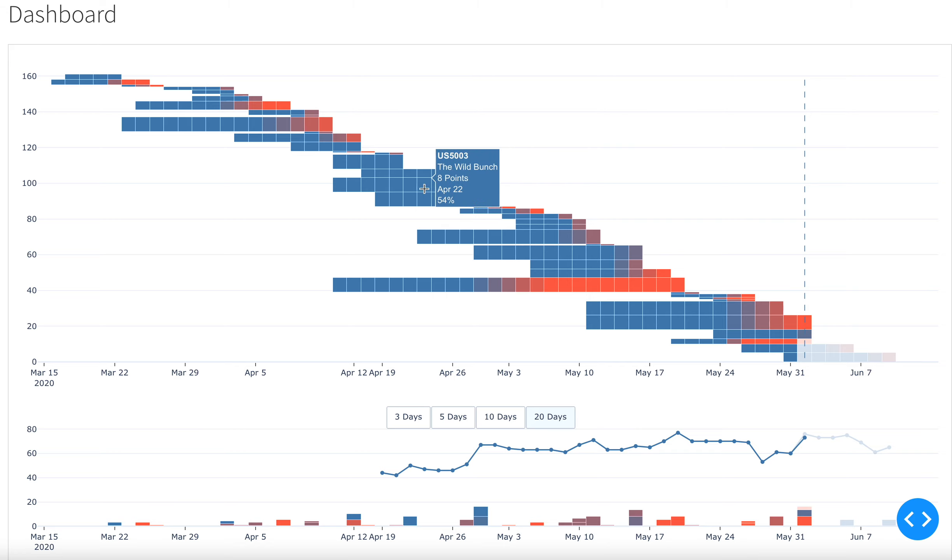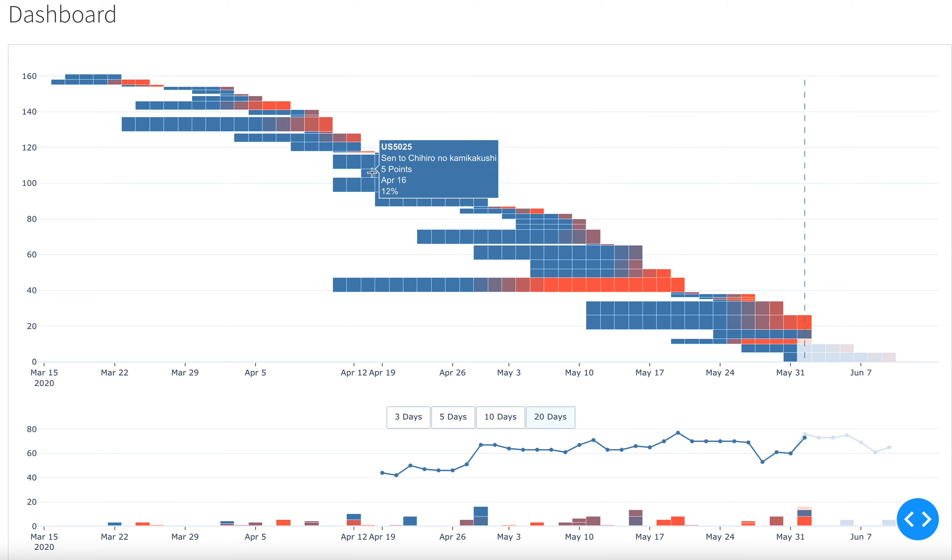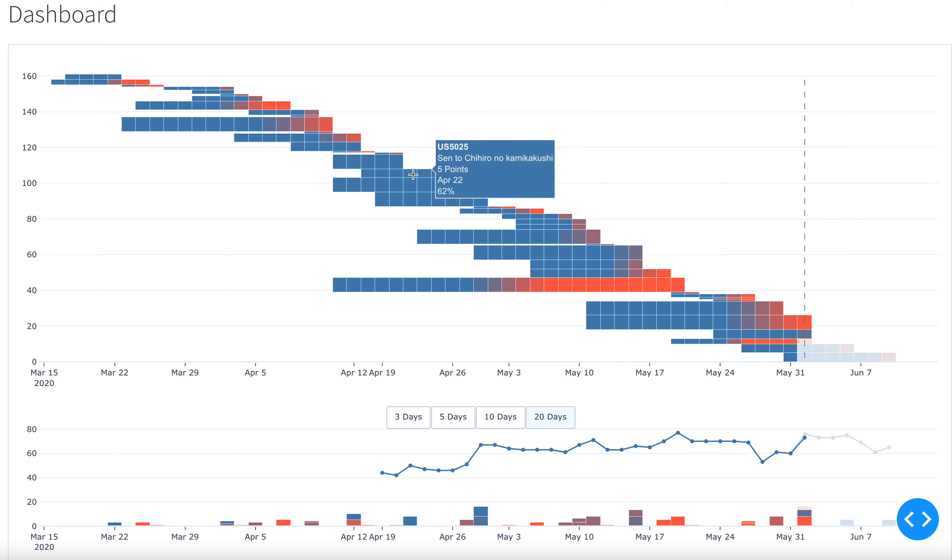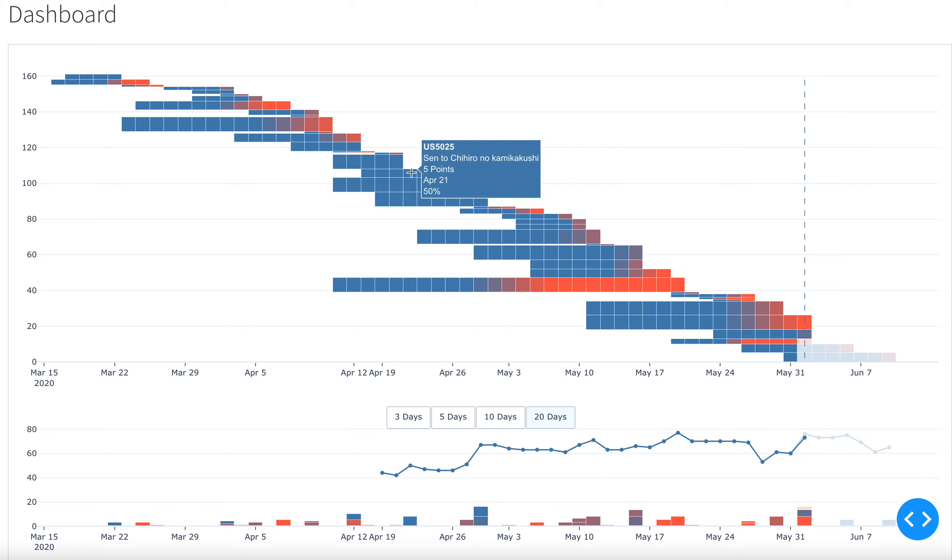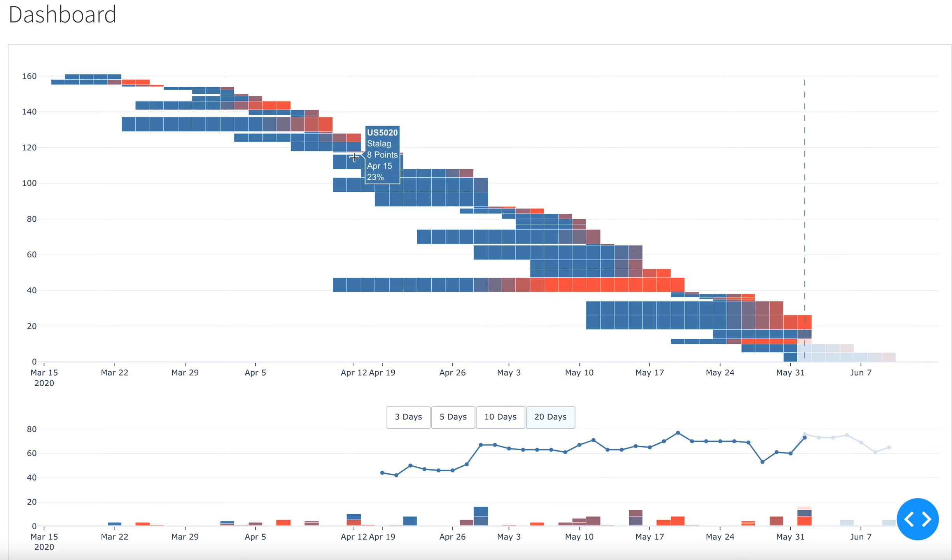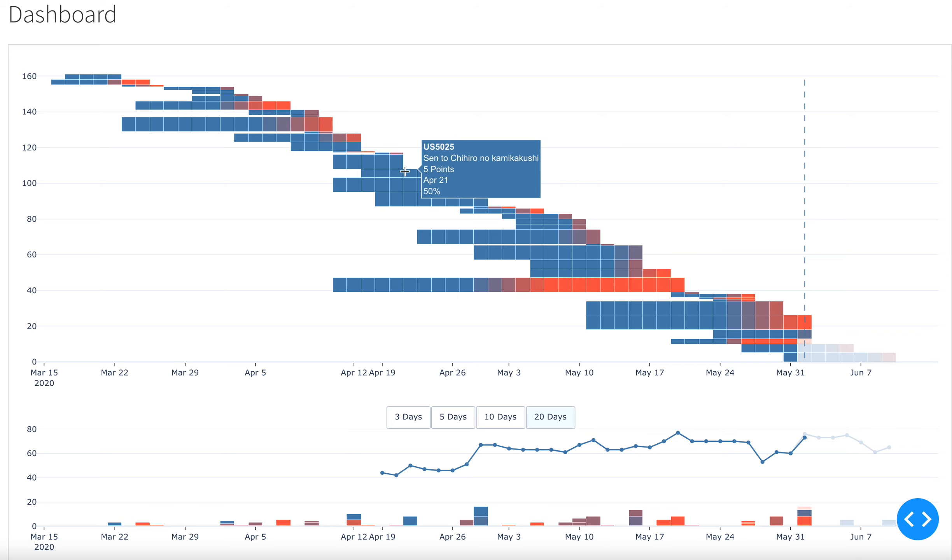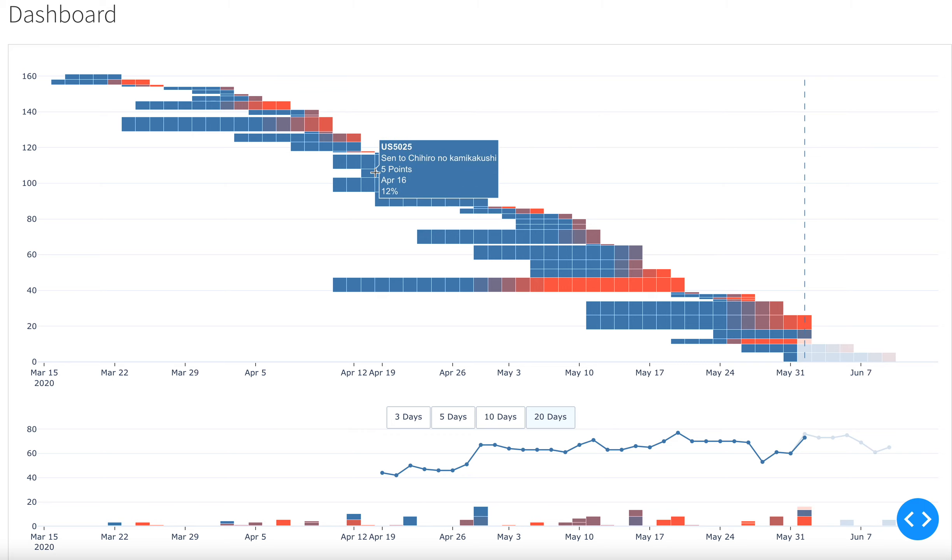The dashboard also makes predictions on how many work days a story is likely to be completed based on statistics from past data. And it shows you here both in number terms, but also through the coloring, where it is in terms of its completion.